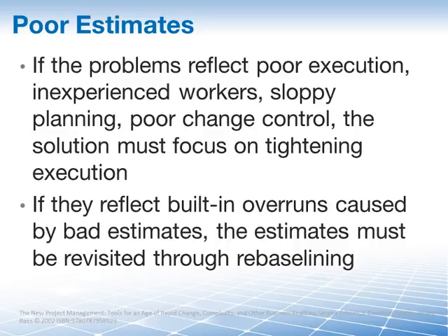But in either case, your project is hopelessly bogged down in a cost and schedule quagmire, and serious thought must also be given to rescoping, project management jargon for changing the plan to match reality, really. This may entail adding additional budget to the project or cutting back on planned tasks, or both.